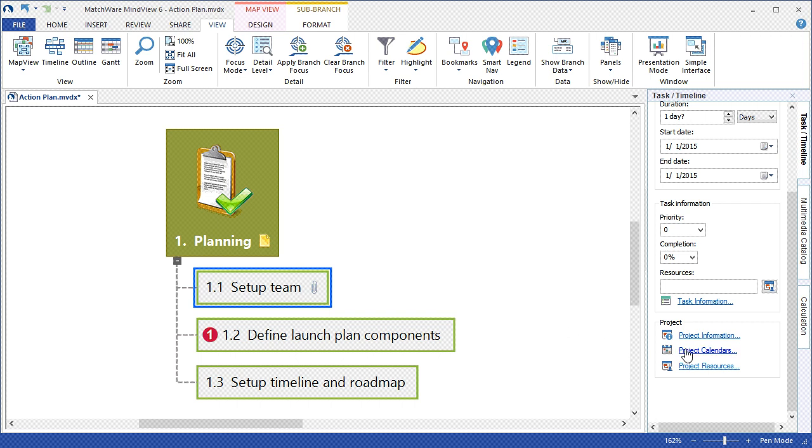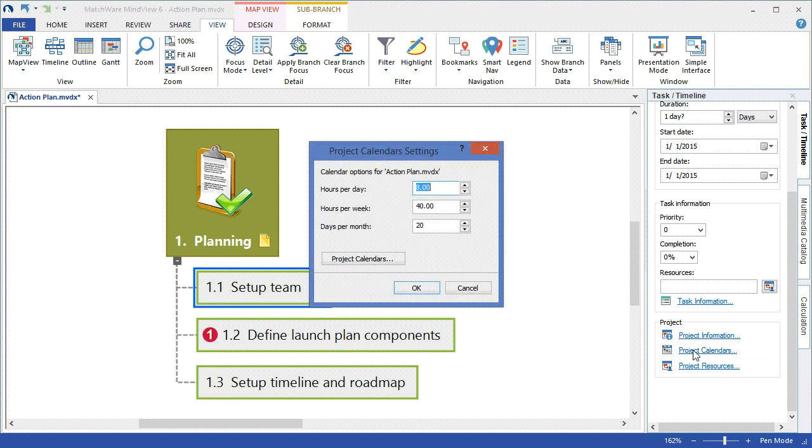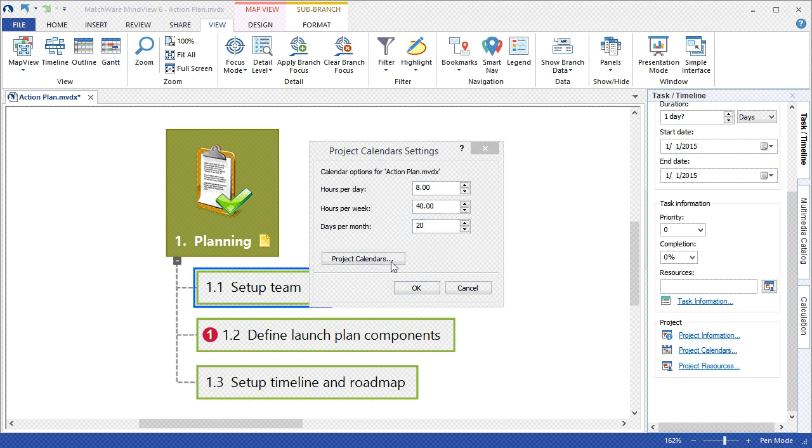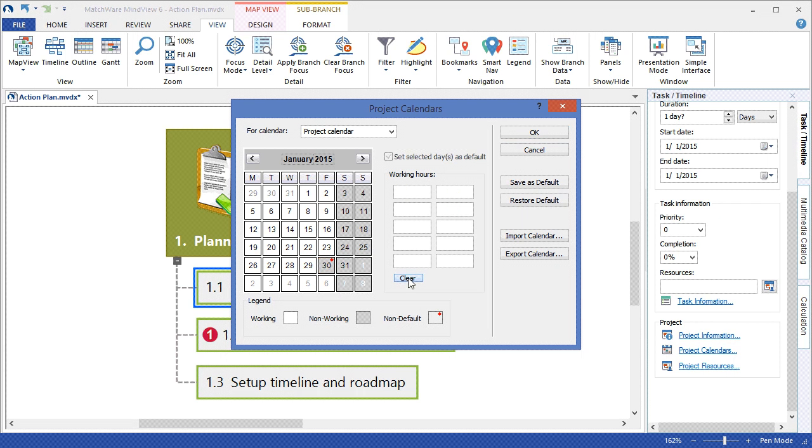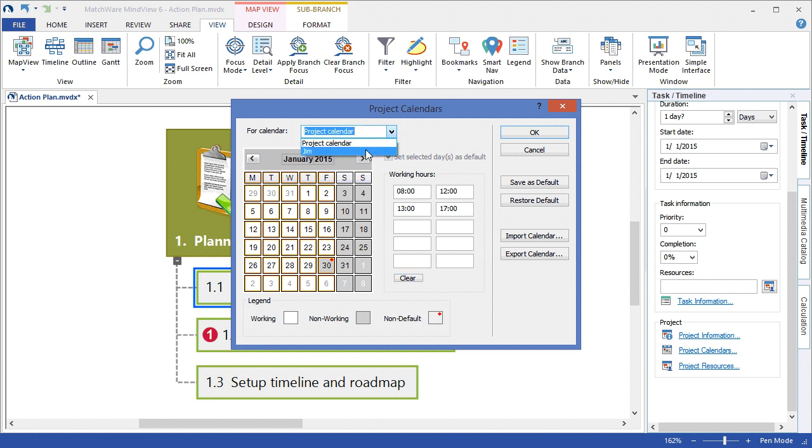The Project Calendar link allows the user to define what a working day is for their particular company. By selecting the Project Calendar link, I can choose to update the hours per day, hours per week, or days per month. I can also associate an existing Project Calendar to list any holidays that may be within a particular working schedule. If I'd like to change hours for an existing month or week, I can left-click the column heading. By left-clicking and dragging, I can change dates for multiple weeks and multiple months. Each individual resource can also supply their own unique resource calendar. Any calendars that I make in MindView, I can choose to save as the default MindView calendar or export and import them with other MindView documents.